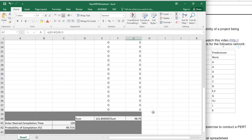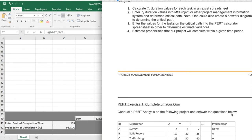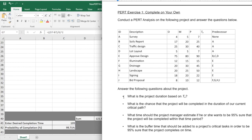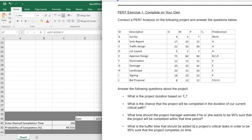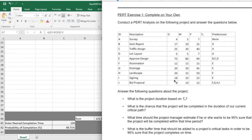Okay, so that's how we do a simple PERT analysis. They can answer questions such as, what is the project duration based on TE? What's the chance that the project will be completed in the duration of our current critical path? That was 50%. What time should the project manager estimate if they want to be 95% sure the project will be completed within that time period? Looks like 135 days. What amount of buffer time should be added? Well, approximately 13 days in this case. So hopefully that gives you enough information on how to conduct a PERT analysis that you can go on to the next step and actually do one on your own and answer these questions.